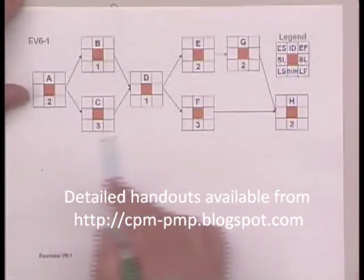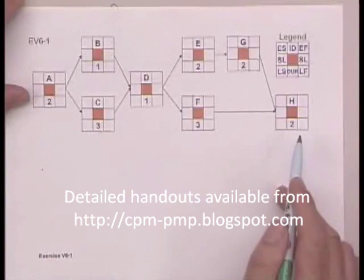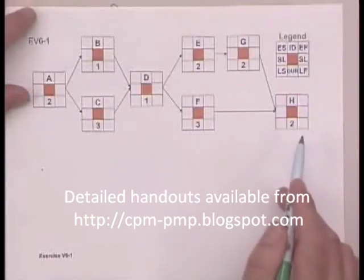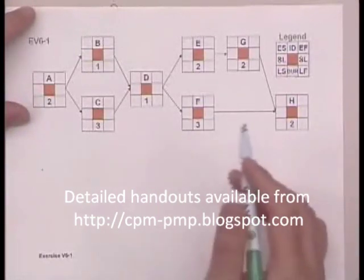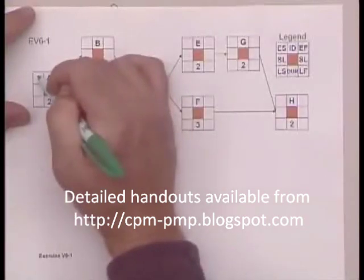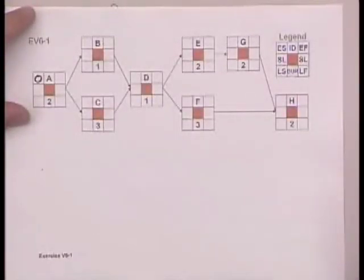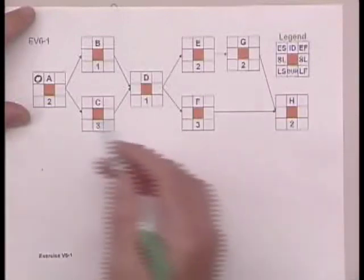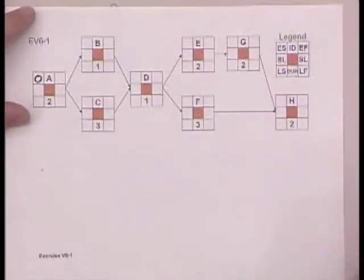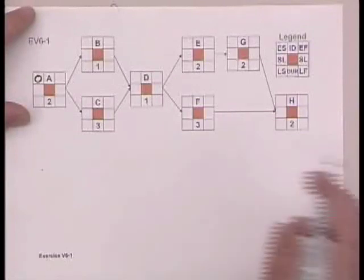So here we've got a network with eight activities, and we begin with the first activity, and the early start is zero. Now, I don't want to argue about how can a start time be zero. This is just how we work the problems. We always start with zero as the earliest start for the first activity.